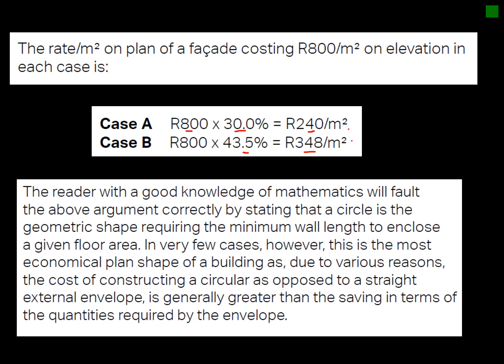There's some explanation in the AECOM book: a round building will have a better cost ratio than a rectangular or square building. However, building a round wall has more technical complexity, which raises the cost again. This is the kind of experience a cost estimator draws on when looking at a design and deciding what rate to use for the external envelope.